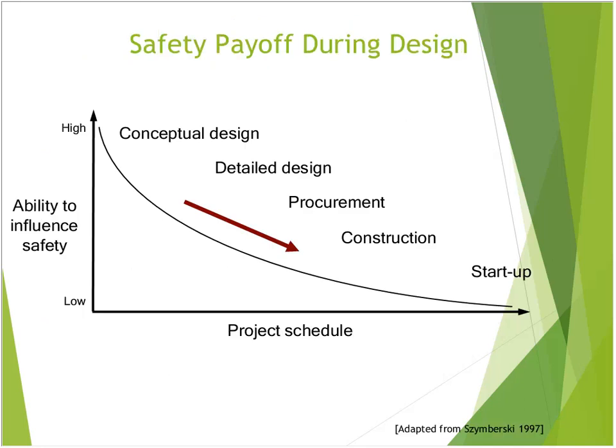Prevention through design can be visualized graphically. The ability to implement safety is a lot easier in the very beginning stages of the project schedule — conceptual design, then detailing through procurement, through actual construction, and finally to startup. If you wait until startup, it's very difficult to get design factors implemented.